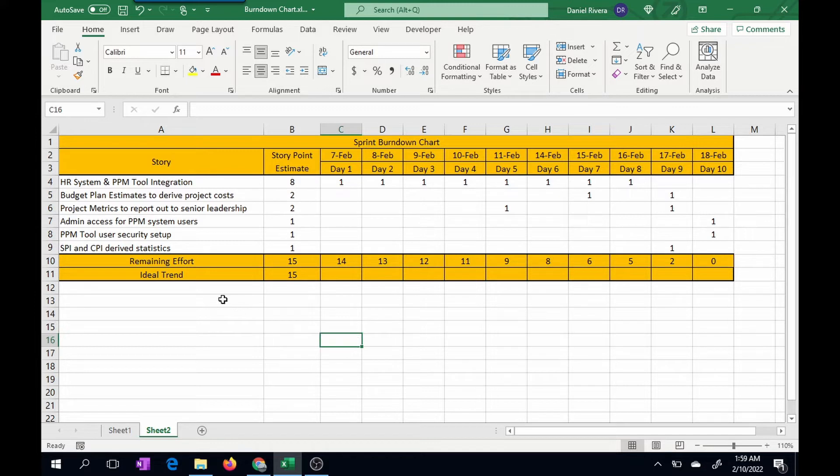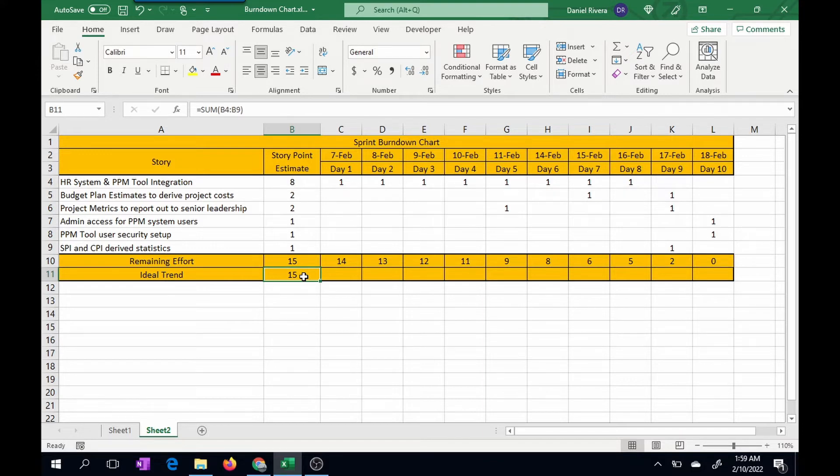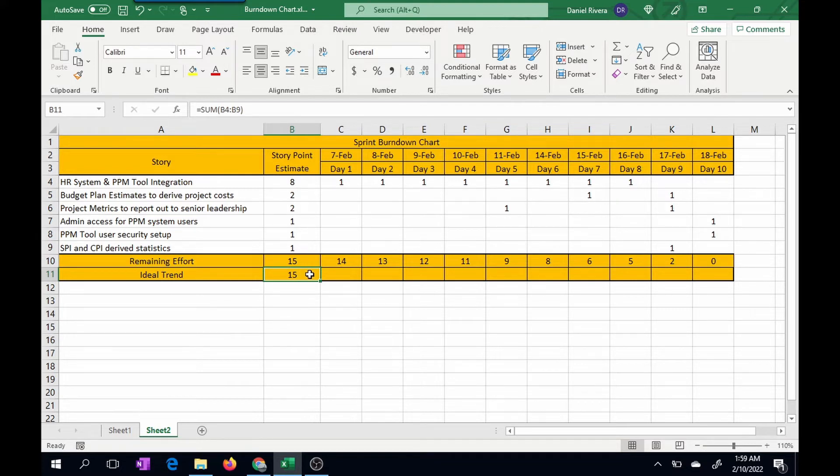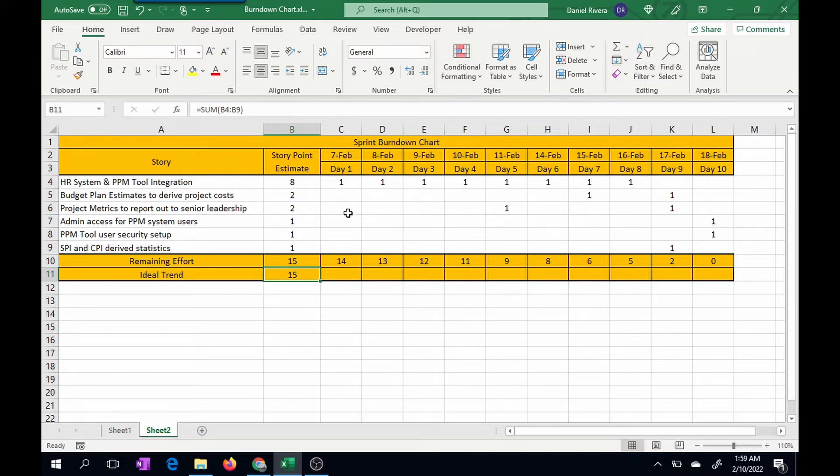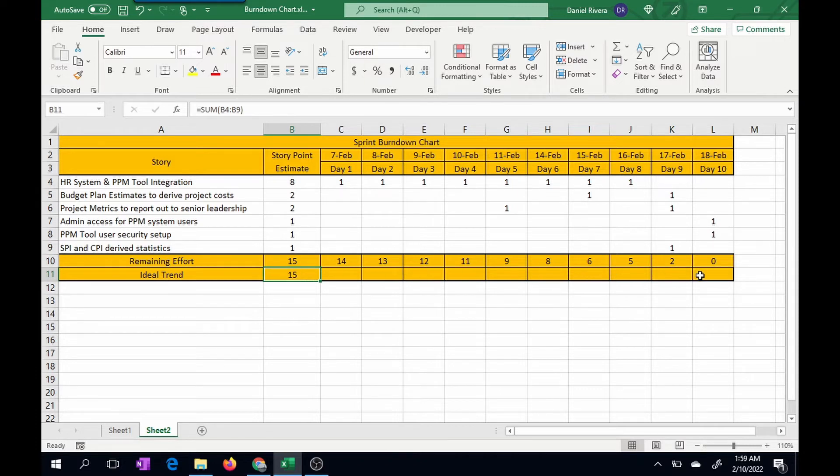So the next step I want to do is to discover the ideal trend. What I need to do is take the absolute reference of cell B11, which is the original estimate. And for each cell, I want to multiply this or take away one-tenth of this particular trend. For day one, it would be one-tenth. Day two, it would be two-tenths, three-tenths, and et cetera. Because you want to get the ideal trend from the original estimate.